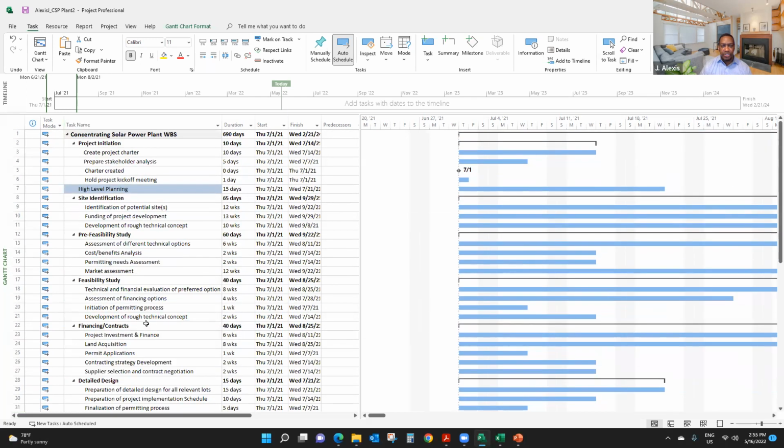So we entered the durations. One thing I can tell you for best practice purposes, in project planning, it is always better to use one unit of measure for planning. In other words, you don't mix up days and weeks. You use only days. Here, what I show you here is that if you mix them up, project will convert everything to days when it tries to give you a durations for your entire project.